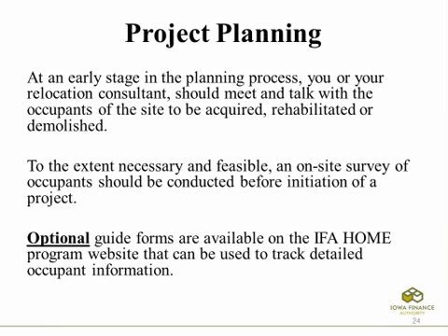As far as planning your project for acquisition and relocation, at an early stage in the process, you or your consultant should meet and talk with the occupants of the site to be acquired, rehabbed, or demolished. I know sometimes before the property changes hands, the current seller may be apprehensive about any contact with their tenants. We have to do the best we can in those situations. Call us and we'll discuss that if you're having issues with that particular item. To any extent necessary and feasible, an on-site survey of the occupants should be conducted before initiation of a project. We do have some forms on the website that may be helpful to you. Those forms are designed to help you identify people that may be eligible for relocation.